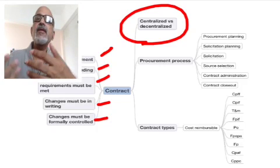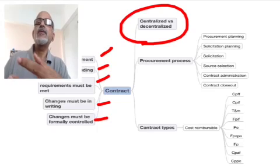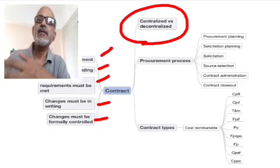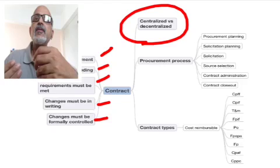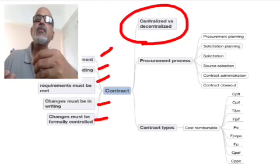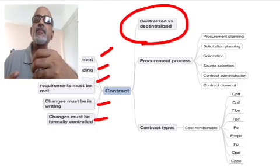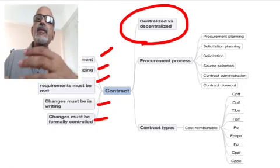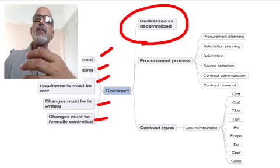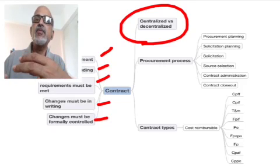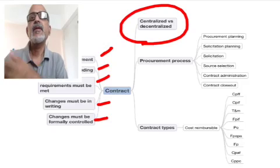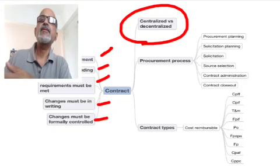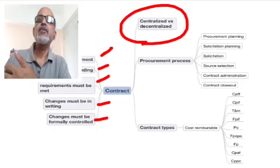If you have a centralized contracting department, the contracting personnel have a career path, meaning you can attract more talent. In decentralized contracting, the personnel may report into the project manager. Since the project itself is temporary, at the end of the project the contracting personnel may be sitting on the bench with no career path, making it harder to attract talent. Also, centralized contracting gives better negotiating leverage with suppliers, whereas decentralized contracting can lose that leverage.